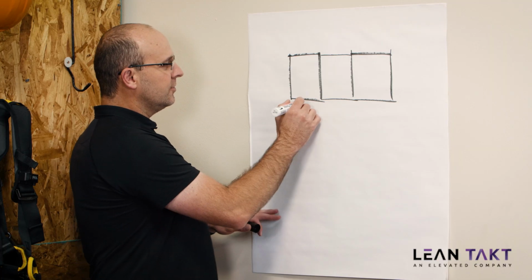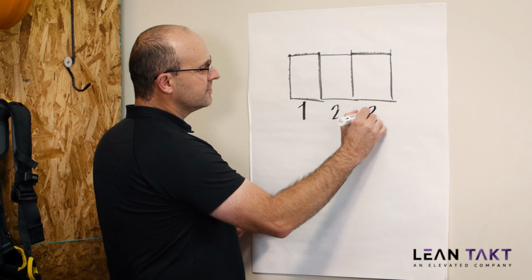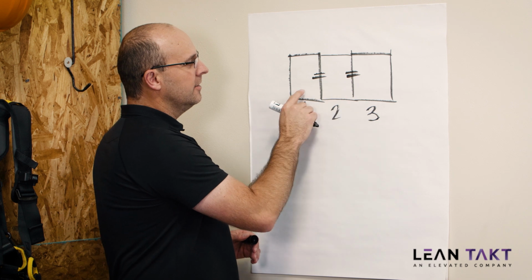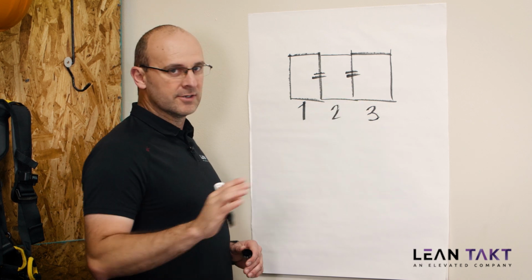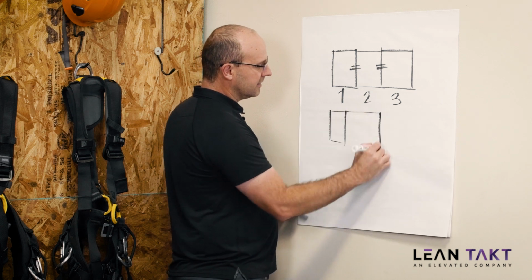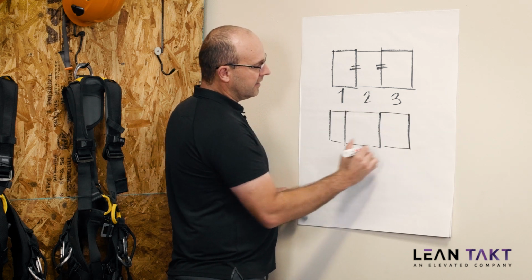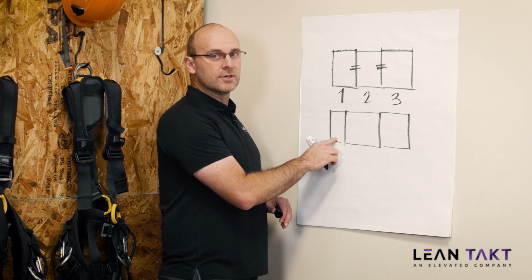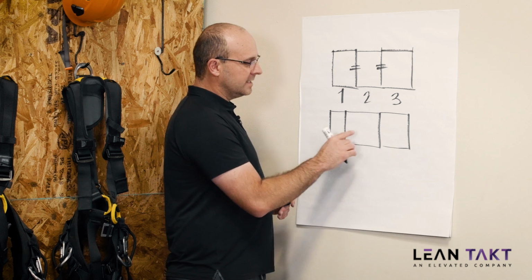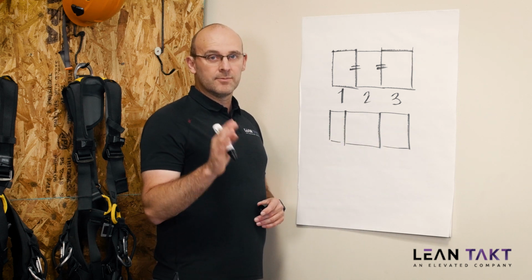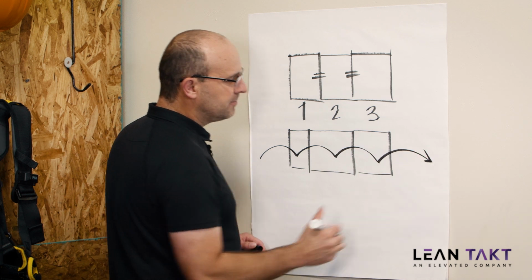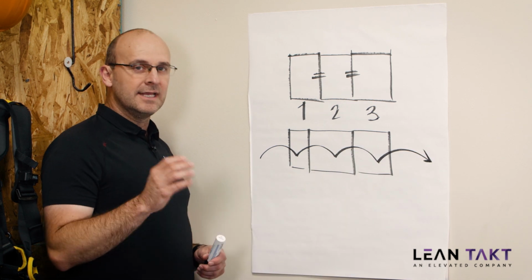So first of all, you already know that if you have zones, we do not make these zones equal area or equal square feet or equal square meters. That's not how we do it. Your zones would probably look something more like this, right? So if you had a zone over here with more density in the work, then this zone would be smaller, because we want to equal these by work density, not by area. Okay, so your trade should be flowing through here and experience a similar amount of work in each of these scenarios.